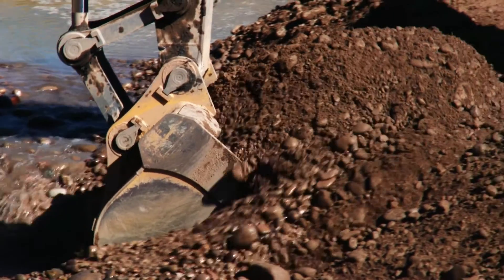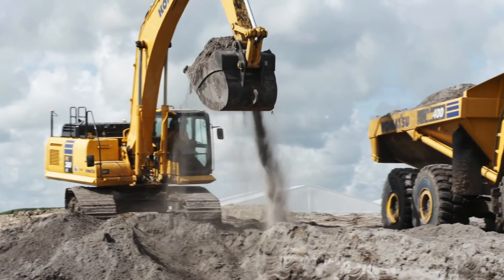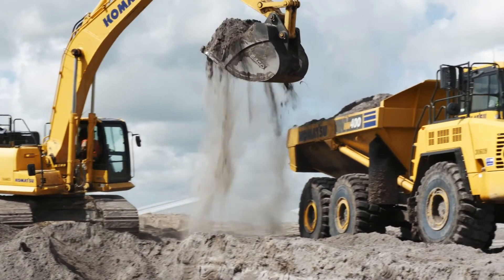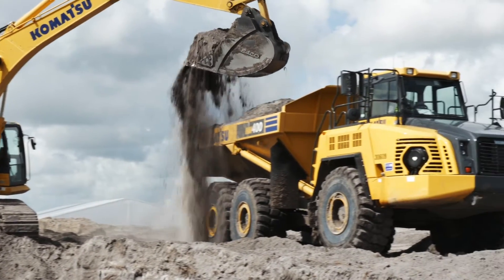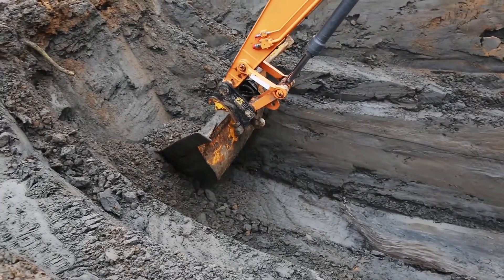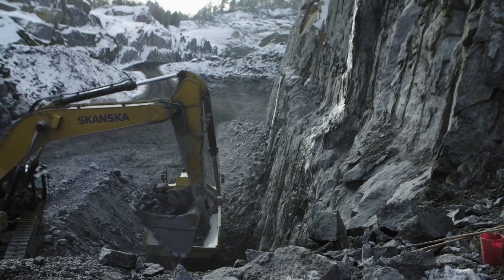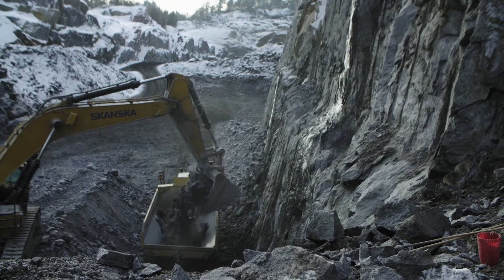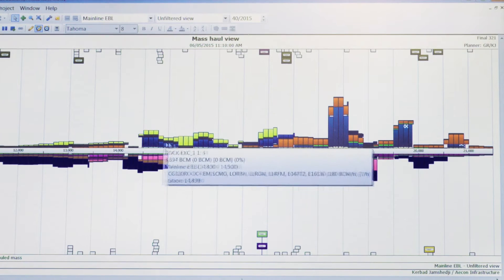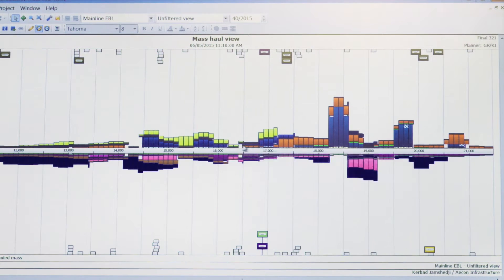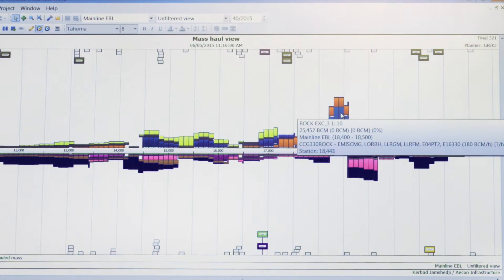One of the great advantages to using Dynarode is that you can consider different geotechnical compositions throughout the project. Sometimes you might encounter sand, sometimes hard clay, sometimes you're in rock — so your production rates are obviously going to differ. The blue color here is showing all the rock excavation or rock cuts, rock embankment or rock fill would be the purple colored ones.